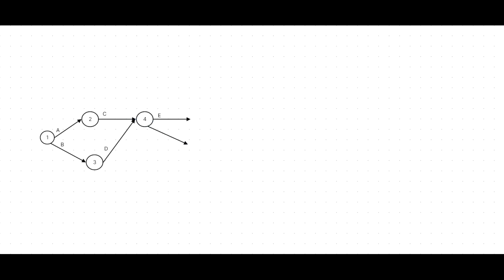You gave the wrong interpretation for the F. The question set for the F needs only C completed, but if you start F from the fourth event, it represents that to start F, you need to complete C and D both. Therefore, this is wrong, right? I purposely wrote the wrong one to explain.